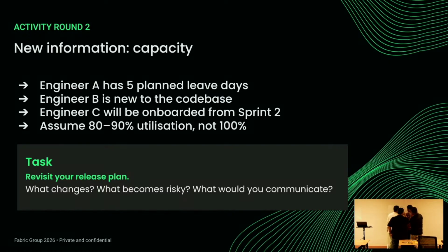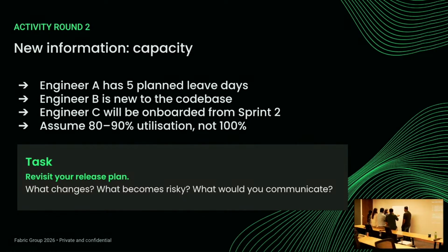So yeah, 20. And then if we consider sprint 3 onwards, that's 30 points in total because we don't have any planned leaves. But we multiply that by 0.8, which gives me 24 because I'm considering the utilization factor. So it's going to be 24, 24 from here on. And that's how your release plan works. Initially, if you would have thought that you will take 5 sprints, now clearly you can see how adding the utilization factor and availability is making your release plan go beyond 6 sprints.